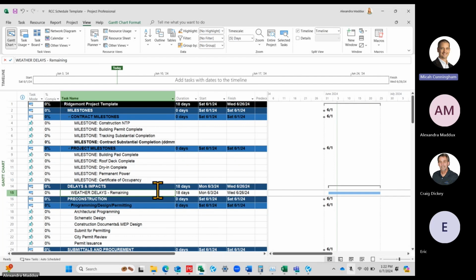You can have it allocated per month, where this month has a certain number of days. But if you try to put a bank at the end of each month, it would have to fall on the critical path somewhere. So then it's going to move as your schedule moves. Your March 1 may end up being April 3rd or something as it pushes. Instead of one bank at the end, you could put banks at the end of a six-month period.